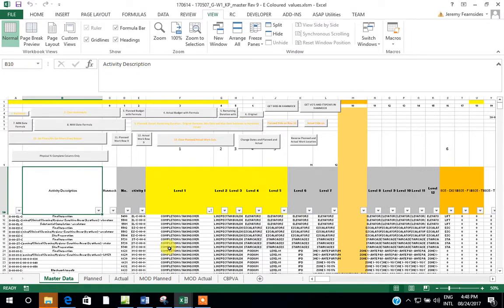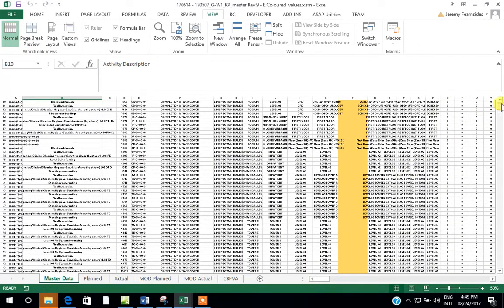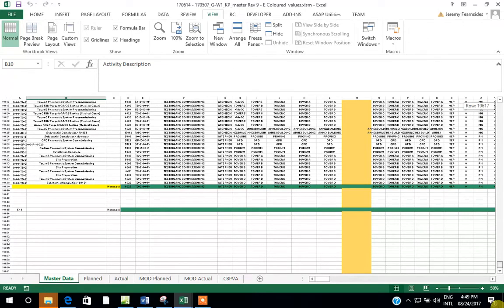Before you is a master data sheet used to define as-built v as-planned progress-based criticality. We've named this sheet static, and this sheet basically provides the data to go to another sheet where we will produce graphs and then calculate data to determine the as-built critical path. Basically, on this sheet we've got 19,000 activities.